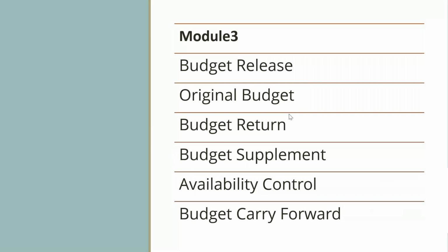Next step is availability control. Now what happens is, not everything needs to be budgeted, right? So in certain WBS elements only, budgeting will be maintained. Availability control means if the budget is available, then only the purchase requisitions, POs will go through the actual cost. The system will only allow if the budget is available. We can maintain those validations. That is availability control.